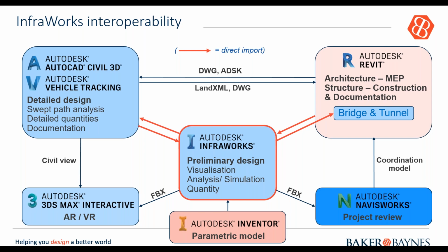If you have been in industry, you know sometimes we figure out things a bit too late, when it's already in construction phase, when that road has been fixed, the alignment has been fixed, and it's a bit too late, if not too costly, to remedy that, because you've got penalties, you've got timelines affected, and so forth. So Navisworks is a very, very good tool used to avoid that.